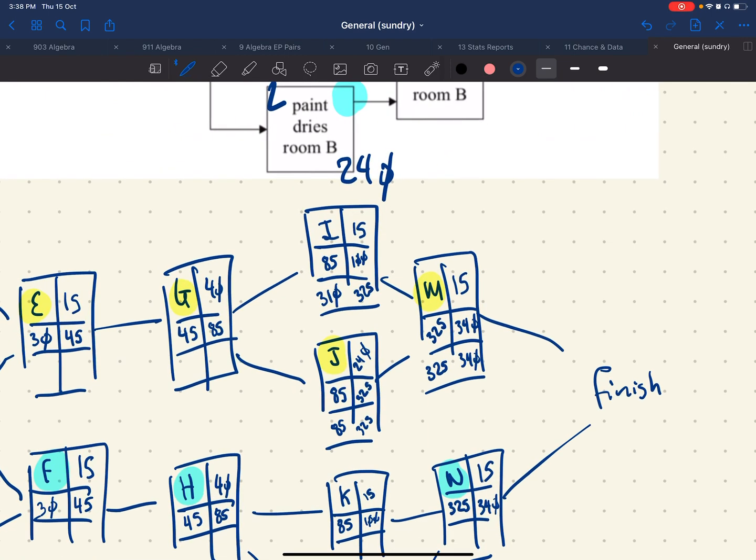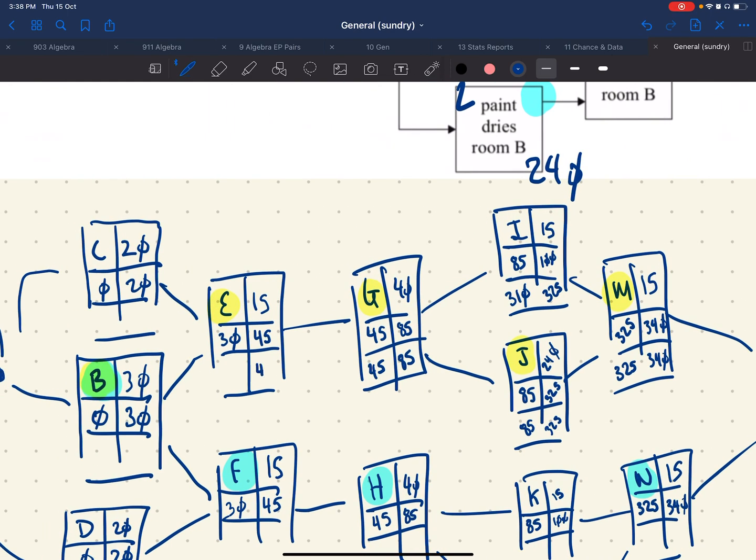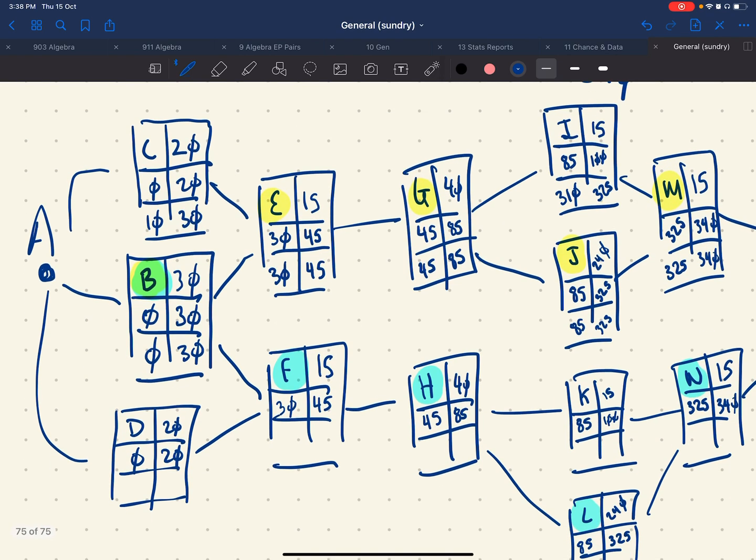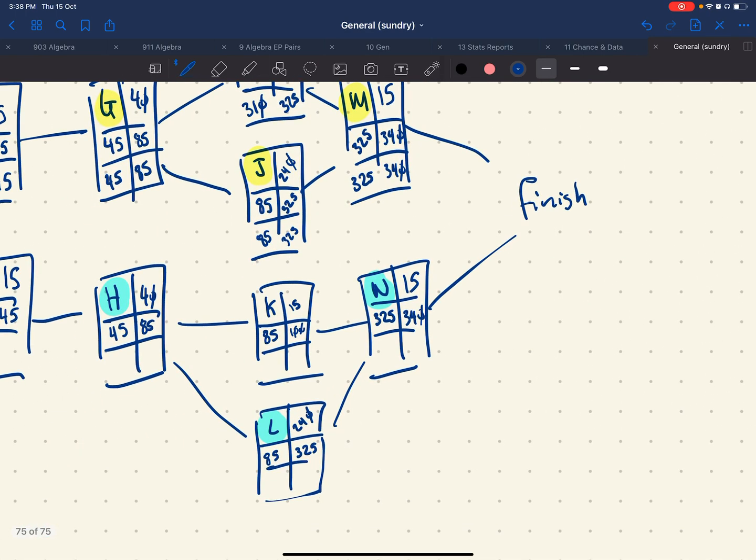Now we're going back here. Okay, again, let's go that path first. So this one here, even though it finishes at 20, the latest I can finish it is 30. So I'm still waiting around for it, which means I can start at 10. And that's going to be the same for the other one. So let's start back here. We've got a similar thing going on.